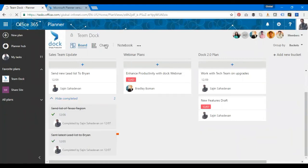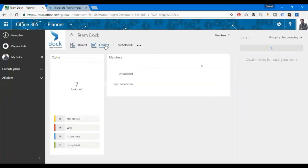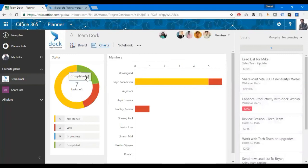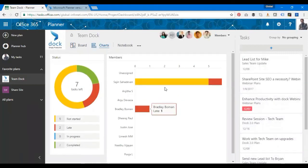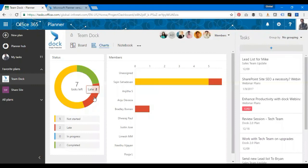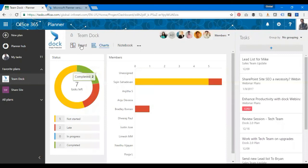I have the charts view. Click on charts, it shows a visual chart of tasks and their progress. I have seven tasks left and one of the members to whom it's been assigned. The yellow shows not started, the green is completed, and two is late. I have to act on them quickly, so the red one shows that. The blue one is actually in progress.